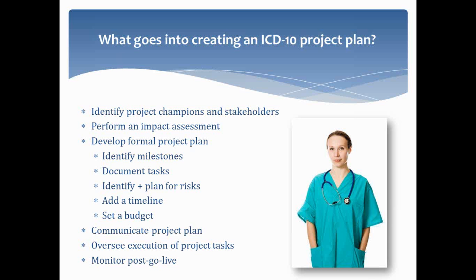And look at budget limitations, and look at that from a number of different sides. Do you need to purchase new hardware for some reason? Is there a cost to your upgrade? Would you need to be purchasing training, purchasing consulting resources, or different tools that might add on to your PM and/or EMR software that will assist you with mapping your codes over? So knowing that you might need to budget for those sorts of things and those changes,